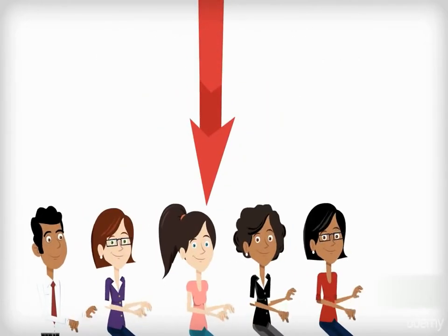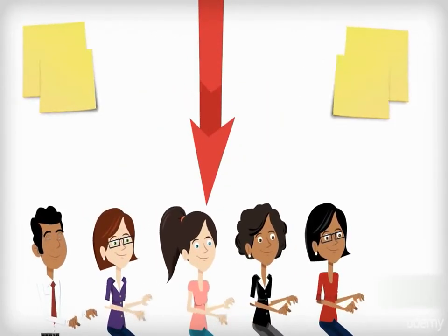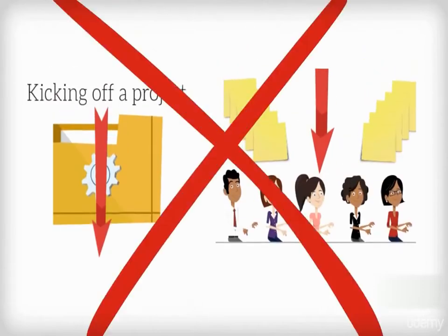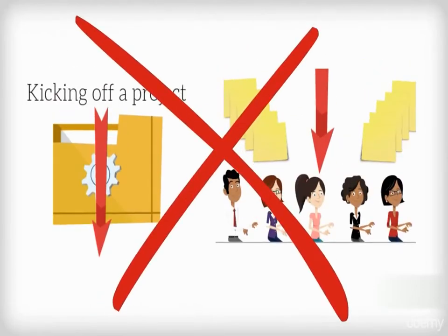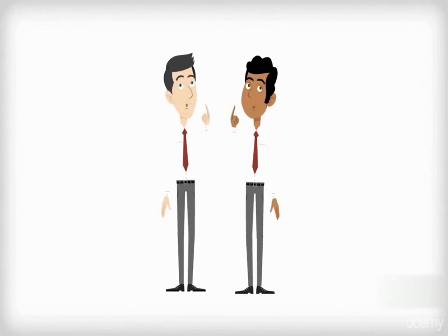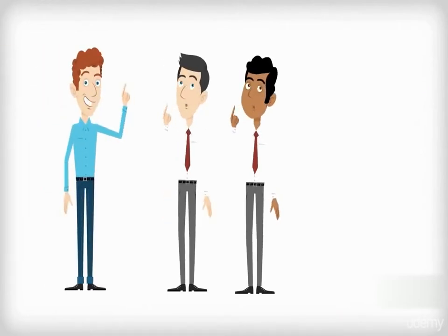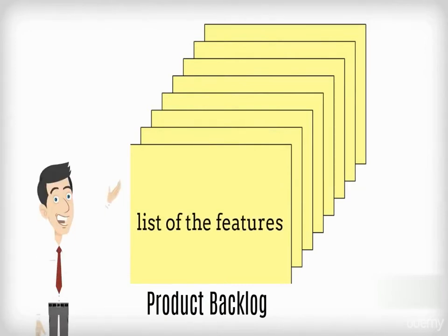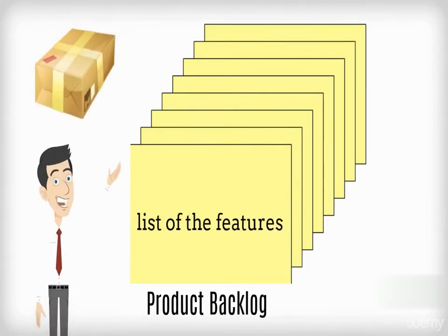It usually results in forcing a team to generate work for themselves while the backlog is built. On top of that, it leaves them without clear priorities for a period of time. Obviously, neither of these are useful ways to put a team of experts to good use. Many product owners know this straight away, but the Scrum Master may need to coach some on the importance and urgency of this. As previously mentioned, a product backlog is nothing more than a list of the features that the product owner desires for the final product.